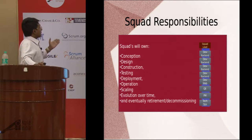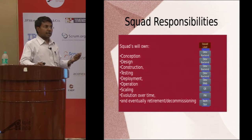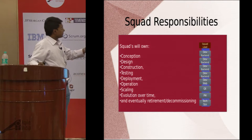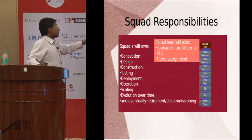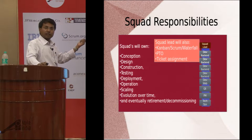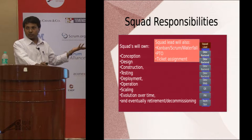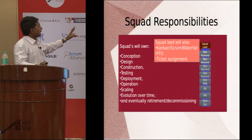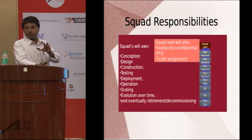The squad owns the conception, design, construction, testing, deployment, operation, and scaling — the full top to bottom of software delivery. The squad lead chooses what particular model to follow, whether scrum, Kanban, or waterfall. The squad lead also handles management activities such as PTO and ticket assignment. This model gives maximum independence to the team, and the team owns the whole product.